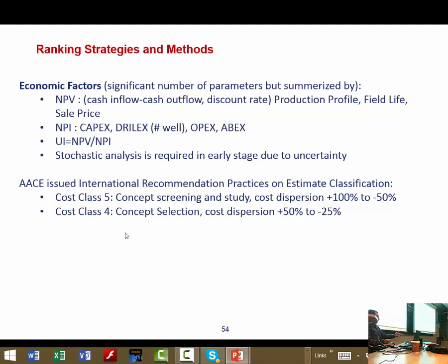Maybe if we have time later, I can show this software to the class, which has some cost tables, and these costs have some units. For example, it's $1 per barrel of oil, mainly for process units. Or, for example, for a generator it is a function of the power of the generator, for example, how many watts. Just a rough estimation based on the capacity for topside.